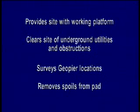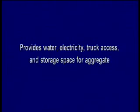Remove spoils from the pad. The GeoPeer installer will consolidate spoils on the pad, but the General Contractor will remove spoils from the pad or reuse them on the site. Other General Contractor responsibilities include providing a source of portable water for possible use by the GeoPeer installer to add moisture to the aggregate, providing electricity, providing truck and trailer access, and providing sufficient storage space to store enough aggregate for 4 days of work.